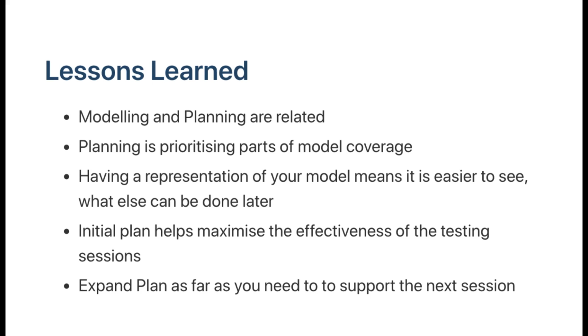Having a representation of the model from a specific perspective, state, life history, hierarchy, flows, events, just makes it easier to see. It makes it easier to see what coverage we're going to do now and what we might have to leave until later, right? Because an initial plan will help us just focus, which allows us to maximize the effectiveness of our testing. And we only, this is key, expand our plan only as far as we need to support the next session.